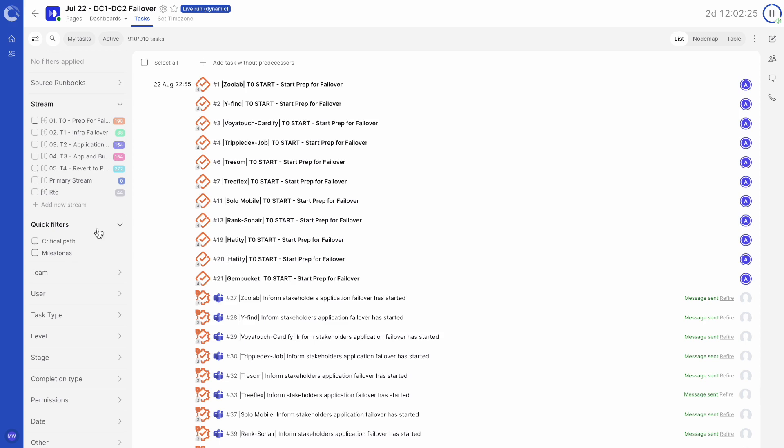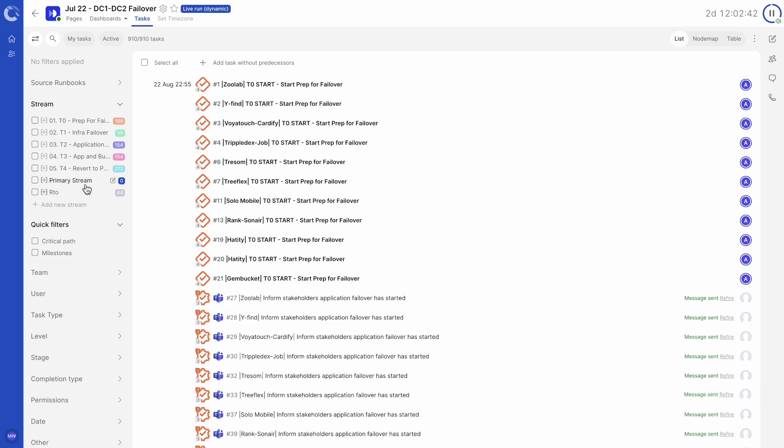First on the list are streams. Streams and substreams organize runbook tasks into groups. Not only does this allow a runbook plan to be built in sections, but they also aid in the navigation and understanding of runbooks. Every new runbook will default to the primary stream.